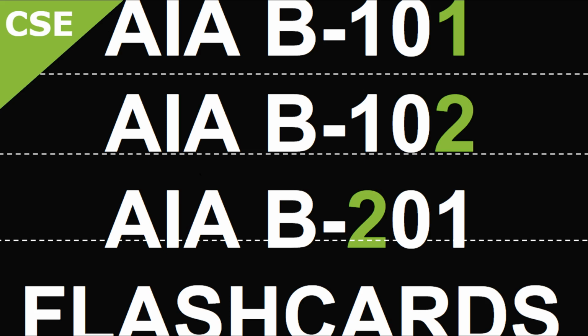What are the architect's options when it comes to an application for payment? If the application for payment is correct, the architect may issue a full amount of certificate of payment. If it is partially correct, then the architect can issue a partial amount that the architect determines is properly due, or the architect may withhold certification of full amount, notify the contracting owner, and ask the contractor to fix the amount.